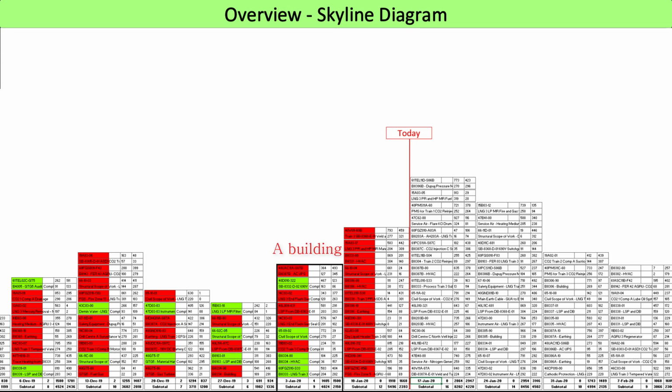The Skyline is composed of buildings. Each building represents stacked activities planned in a week. The height depends on the number of activities planned in a specific week. Each floor represents a single activity with internals, that is, activity ID, description, plan total, and achieved total. Activity progress is highlighted with different colors: complete, overdue, or forecast for next week.